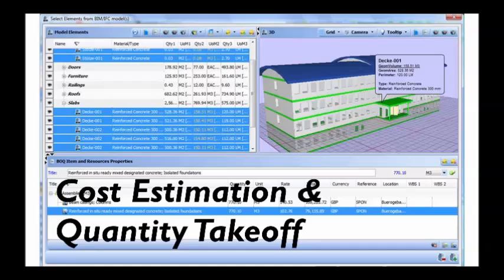And you could say, okay, I know that this roofing material costs this amount of money per square foot. And then if I look at how many square feet I have in terms of roofing, then we're going to apply that as a line item in the budget, and then we get that number.